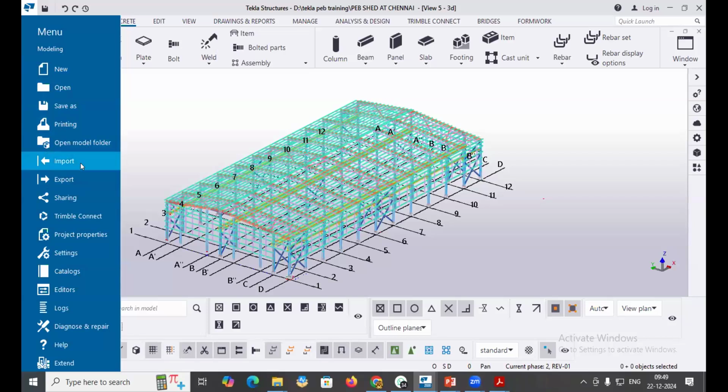for the purpose of design, estimation, and BIM-related software. You can import any file or export any category of files from it. And if you see here, in the import and export file types, what plays a major role? Before getting into a project bid, we need to know the total weightage of the project. Previously, without applying any connections, from the start model they would take off the steel quantity for the major set of drawings.